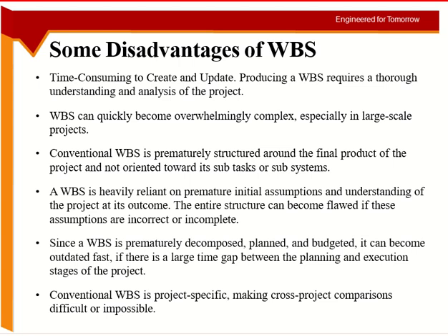So the first disadvantage is preparing a WBS takes time. It requires effort, and if any change happens in the project, you need to go back and update the WBS. So the WBS has to be interactive. It will take a lot of time and effort to prepare the first draft, and after preparation you cannot leave it, you have to update it as well.